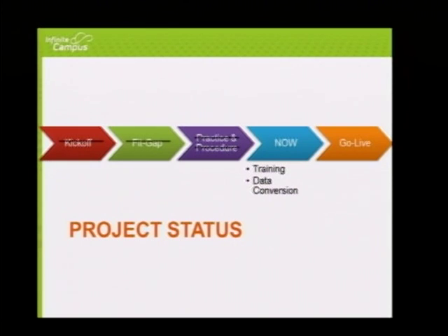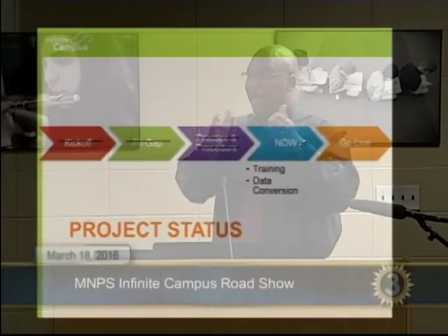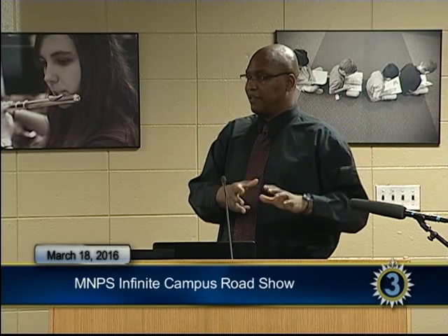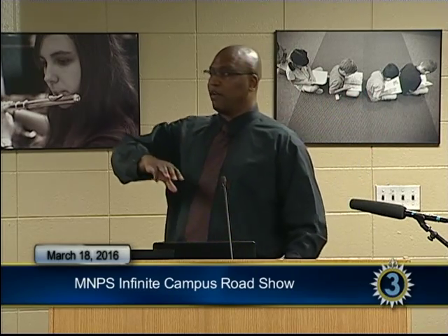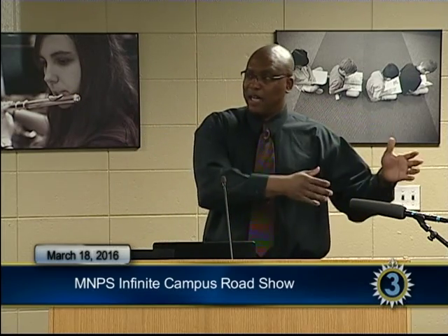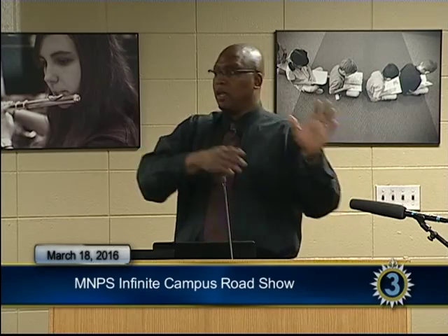Excuse me, and now data conversion has also been going on for the last several months. To briefly talk about that, what we've been doing is basically doing practice trials. We'll try 3 times before this process is over. And then the fourth conversion will be the actual conversion of all of the data that lives in PowerSchool SMS into its appropriate home inside Infinite Campus.